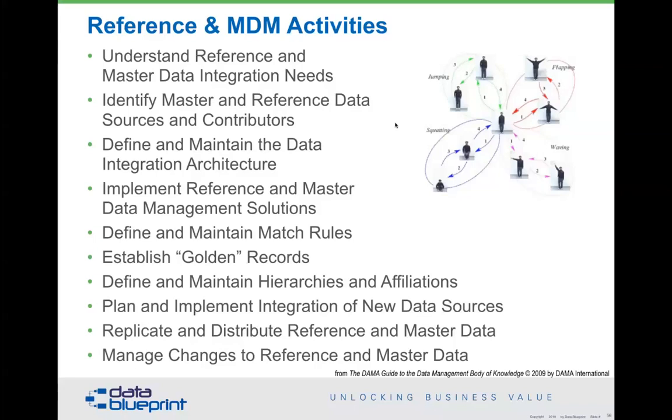You need to establish the golden records. All right, so now we've decided what we're going to do. What does a doctor record look like? When I'm working with organizations, the one thing that I tell them is very clear: for each phase of the project, they have to have an absolute, objective way of determining whether something is master data or not. Now, you might go back and say, well, it's anything that's a person, place, or thing, right? Well, no, you really don't want to do that, because that's a never-ending project.